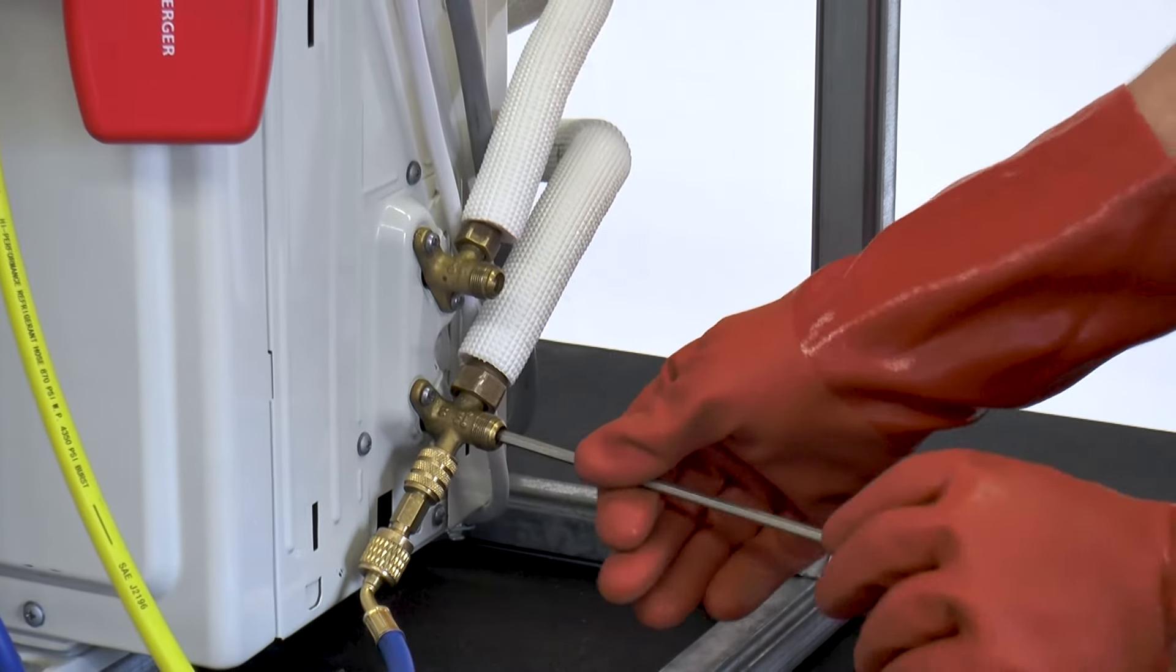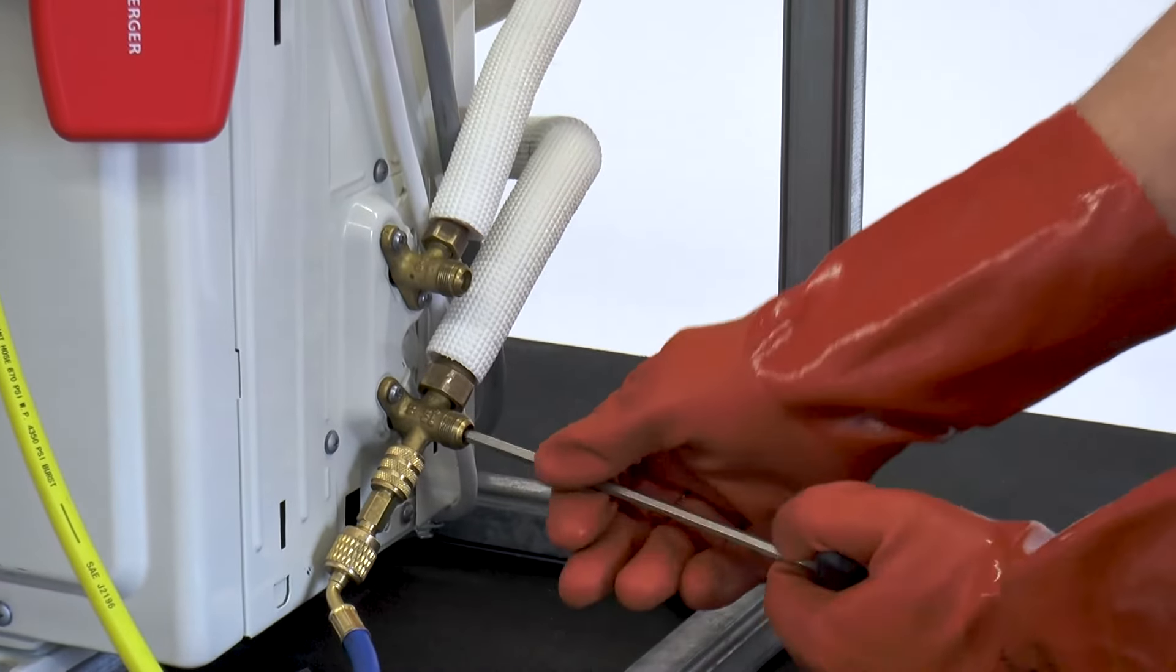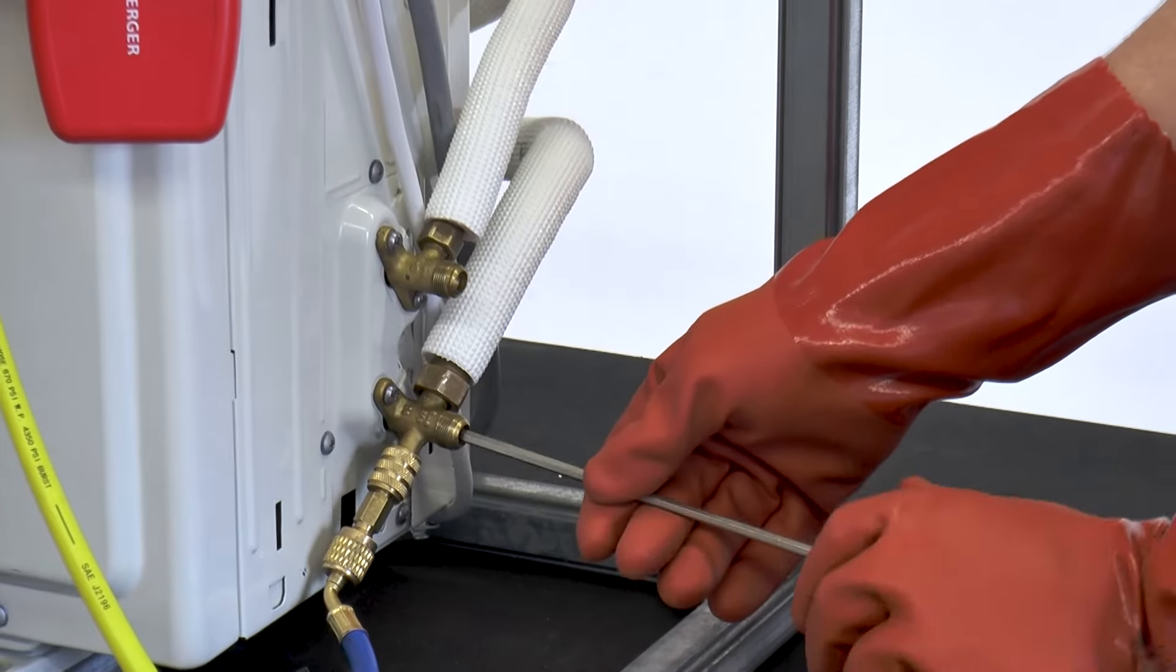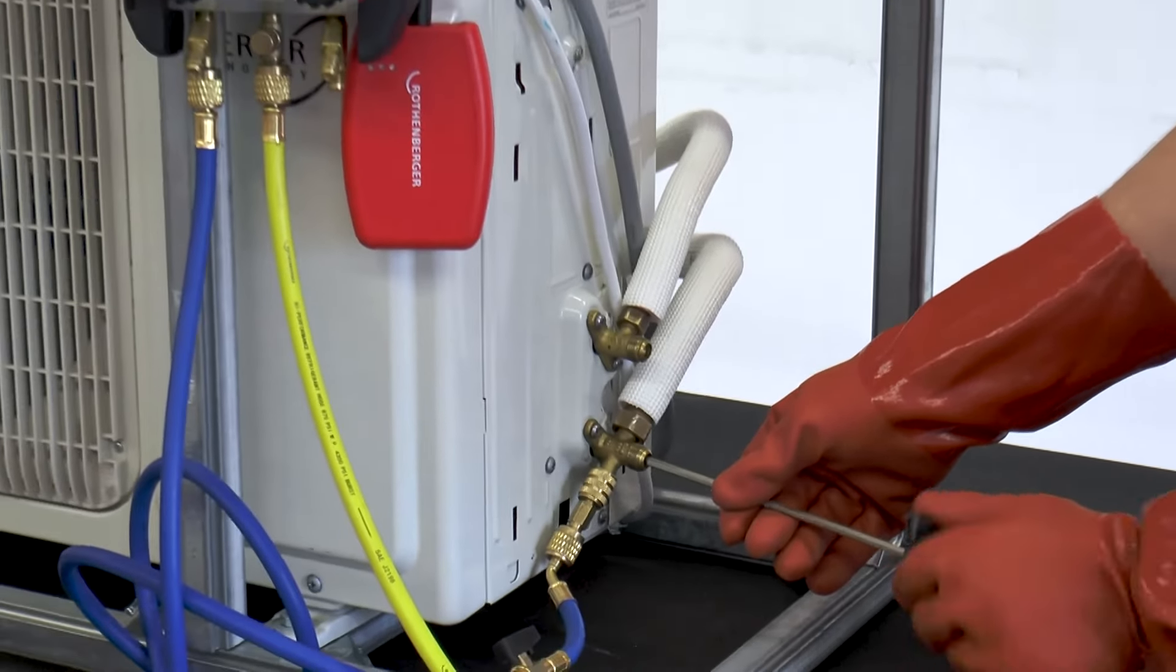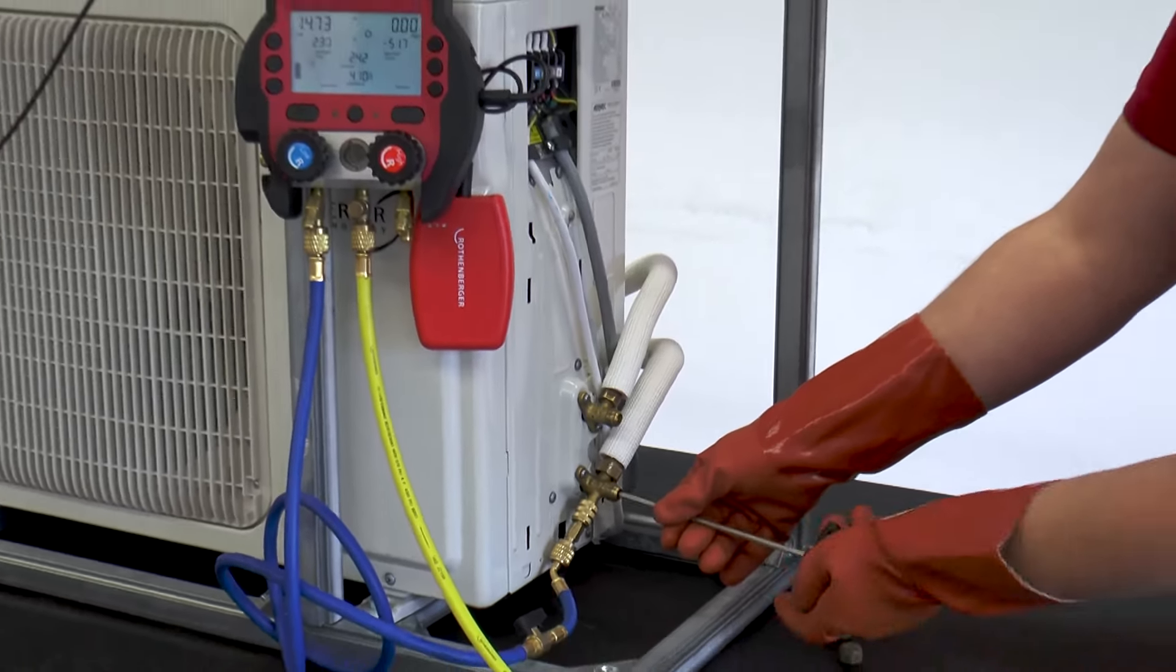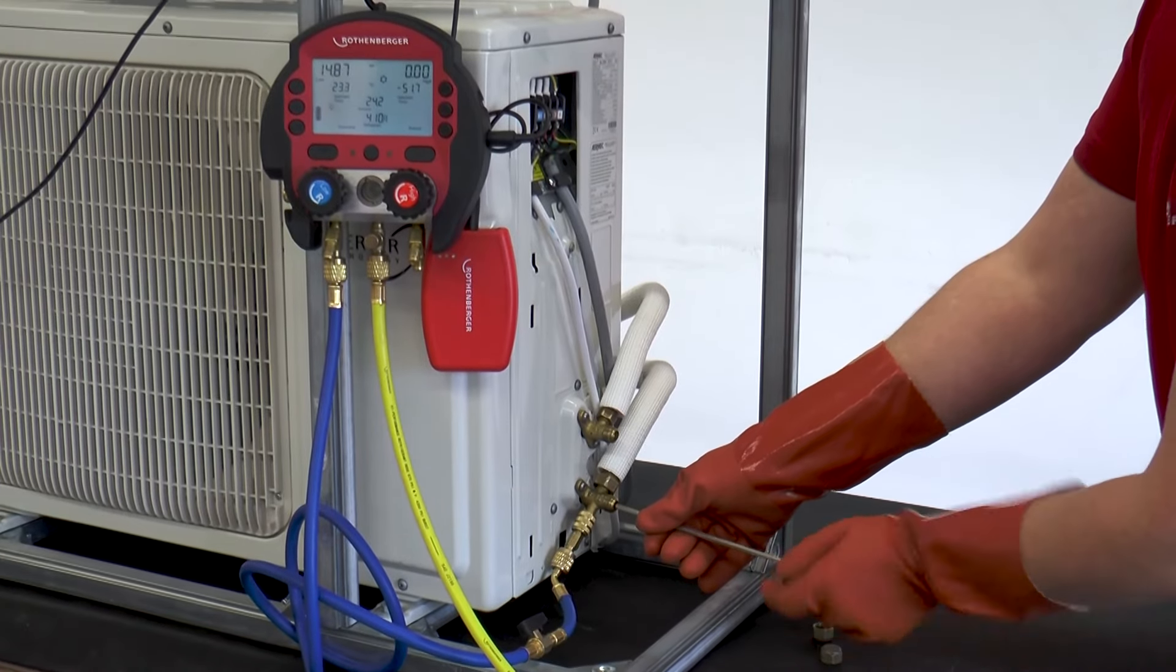After the grub screws have been completely opened, the unit can be switched on and put into operation. During commissioning, make sure that the system runs correctly and that the system data is correct.